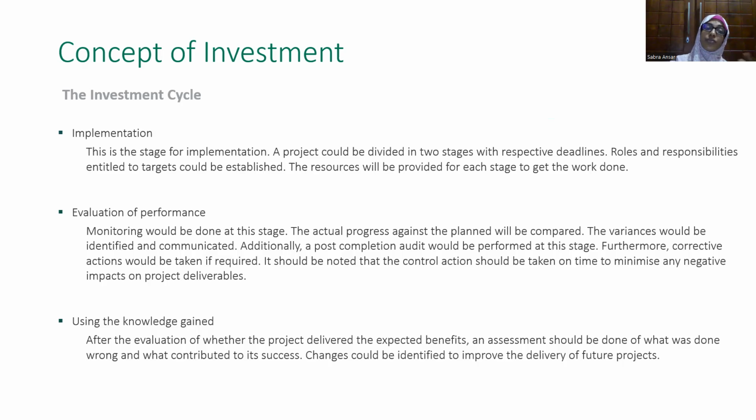Thereafter, evaluation of the performance. At this stage, the monitoring happens. The actual progress which is planned would be compared to the budgeted, as I told. The variances will be identified, and a post-completion audit would be performed, and corrective actions would be taken.